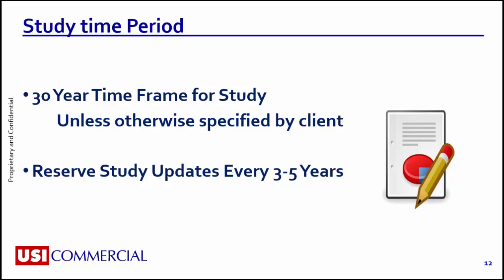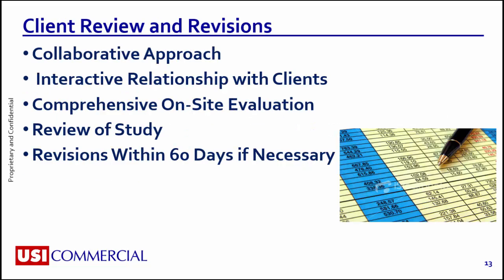Now, it should be noted that regular updates to the study will be necessary due to changes in property and building conditions, changes in funding status, and fluctuation in component and inflation costs. We generally recommend a Level 2 update between 3 and 5 years of the initial study.